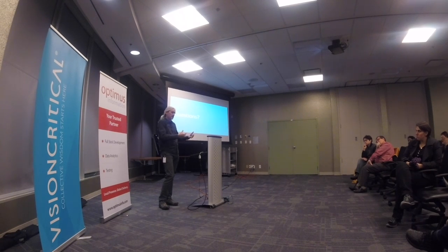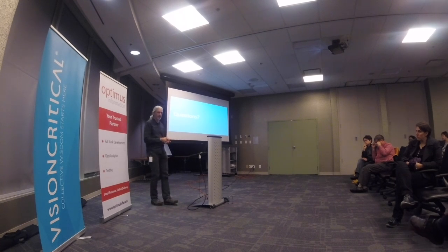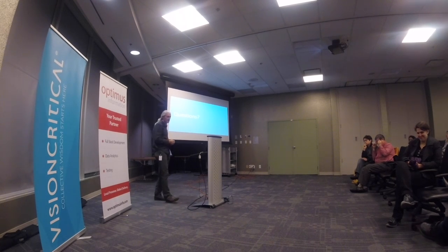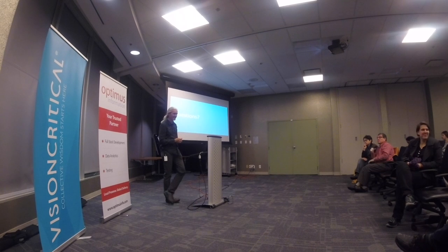Because you've got hopefully lightweight, fairly cheap to produce documentation as you went along, you should be able to go back and pinpoint, oh, yeah, I think of that one. And then you learn from that and add it to your risk catalog or your heuristic or whatever it is. Get better. Don't be perfect, just get better.